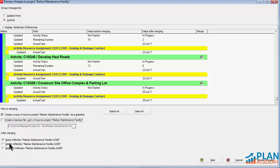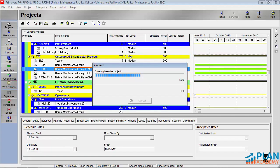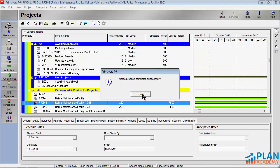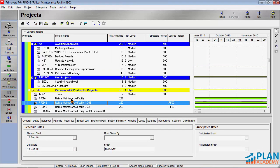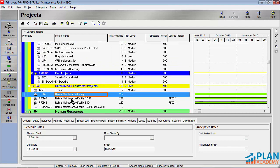I'm going to stick with the baseline for now. Also after merging, what do I want to do with that reflected project? We can keep that reflected project around and then you'll be able to go and view it or you could delete it if you want, because those changes are incorporated in. So let's go ahead and merge these changes in. Merge process completed successfully. Great. So the ACME project is now merged into my rail car maintenance facility original project.